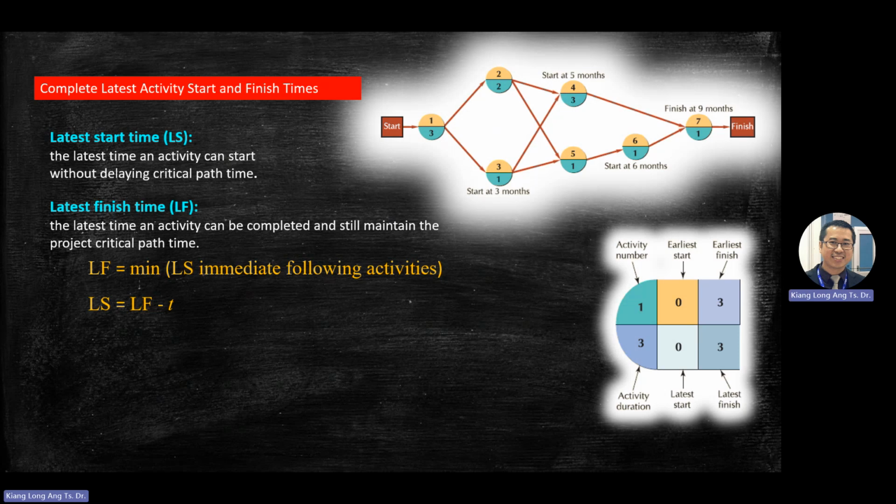Okay, so we are now doing the last station here. Usually this number is the same as this one. If it is the last station, you just copy the last one. How to get this number? You take this number minus this number, you get this number. You back pass it. Yeah, you take this number minus the time, you get the answer of this one. Okay, one is forward pass, one is backward pass. So if you understand this one, you can do questions for this topic already.